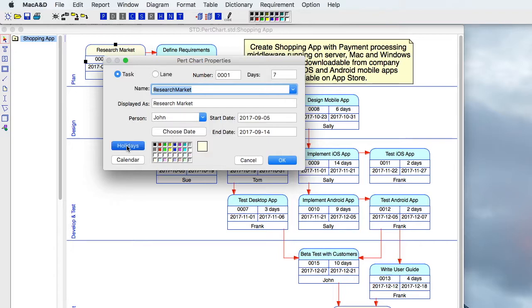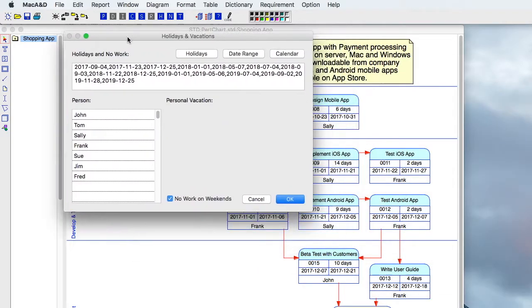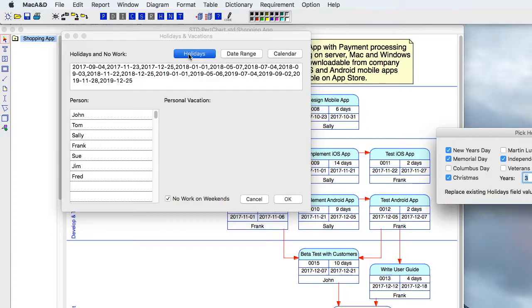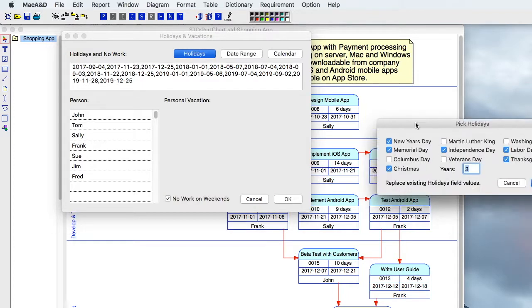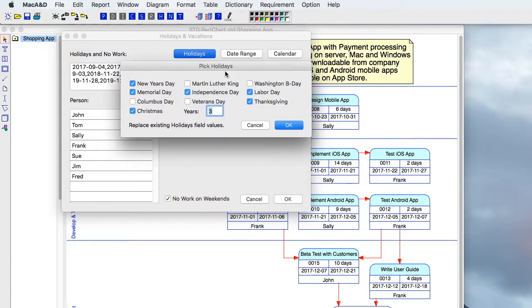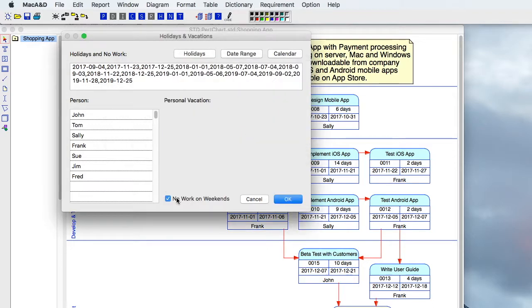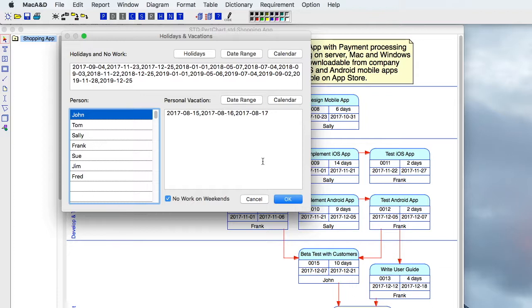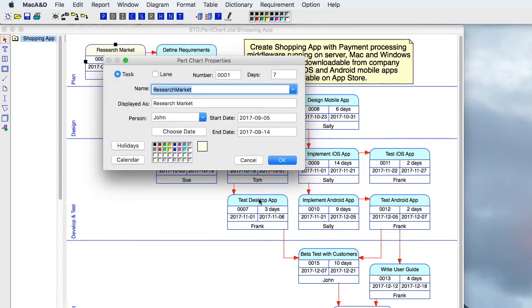If we bring up the holidays and vacations dialogue, that's where we can designate all the holidays that are observed by our company, whether or not employees will be working weekends. We can create a list of employees, and for each individual employee, we can assign personal vacation days so that we don't schedule activities for those specific times.